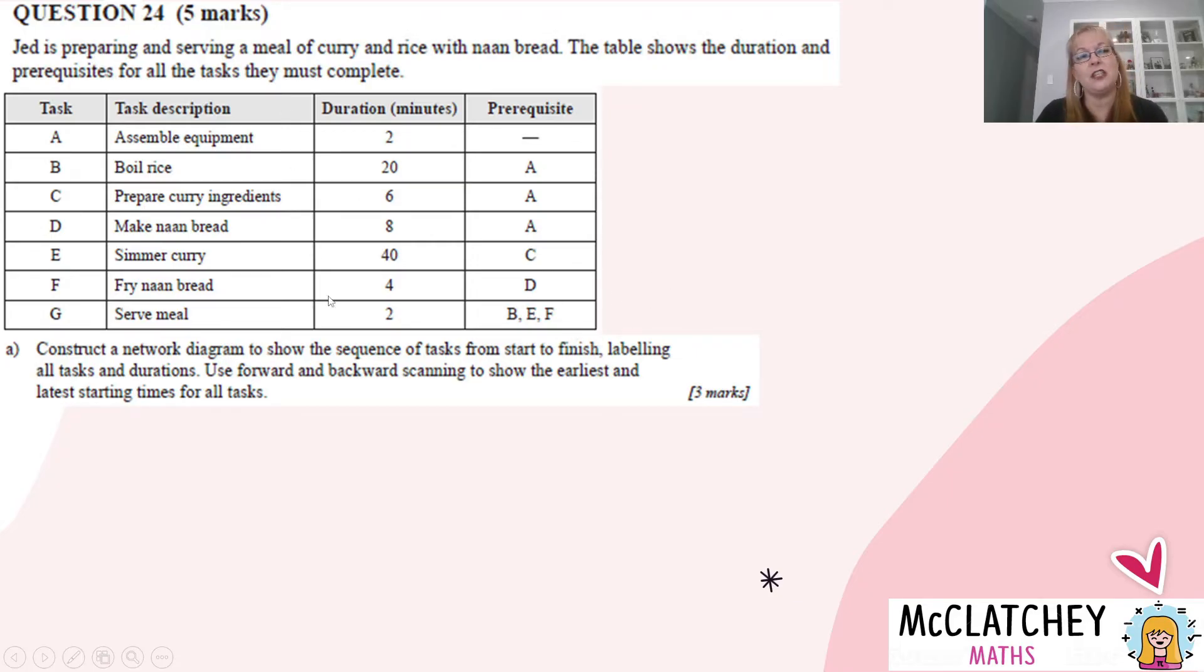So if we just have a bit of an investigation here, we know our first task is going to be task A. It has no prerequisites, and it's got three different activities coming out of it. So let's start with drawing one of these bubbles with the line through the center. Your textbook might do it a little bit differently. However you've been taught is fine.